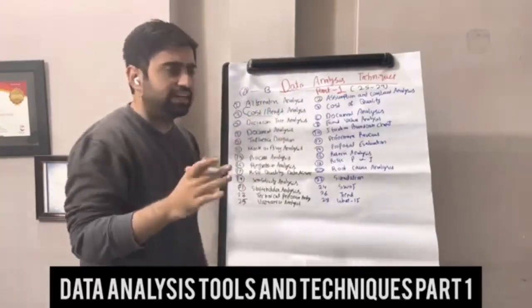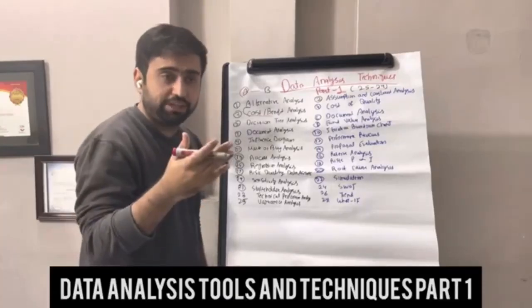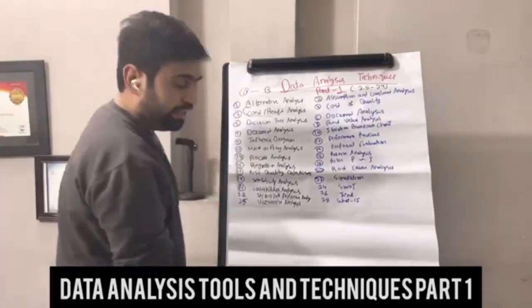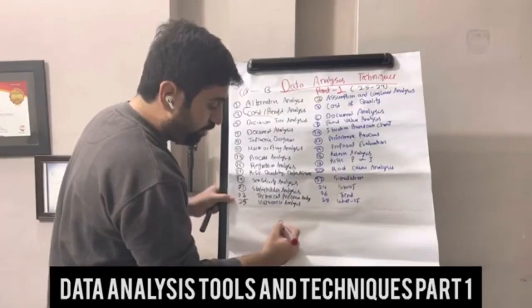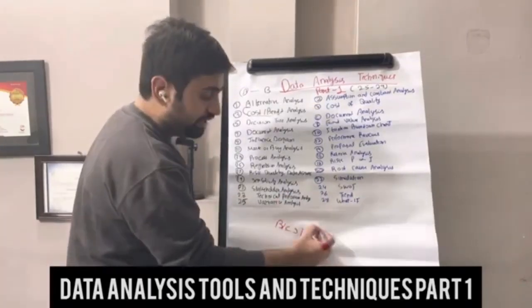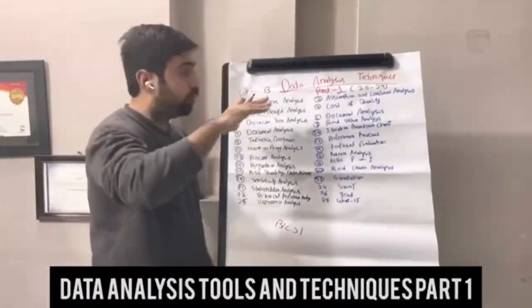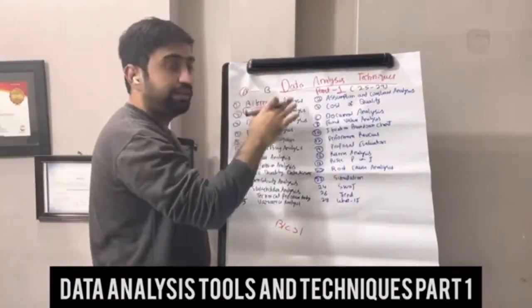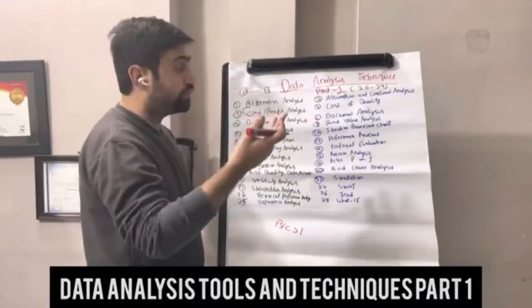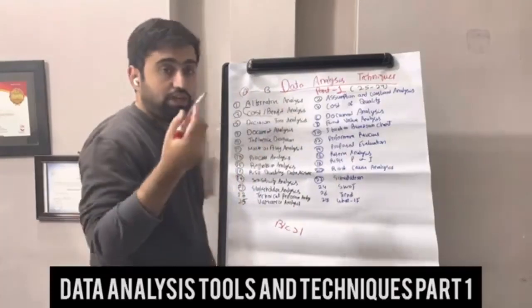Whatever it is, always understand that both have the same meaning. The only difference is that if we put benefit to cost, the greater it is, the greater than 1, the better it is. If cost to benefit, it will become the reverse of that. So coming back to the point, two options, we compare their cost to benefit, and then we choose the alternate accordingly.